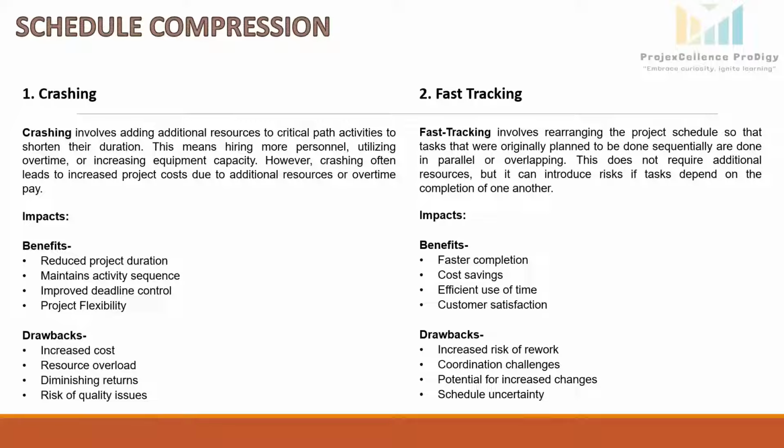So, what will he do? He will hire additional workers to speed up construction activities. He will bring in more subcontractors to work on different tasks. He may extend work hours by scheduling 2 or 3 shifts to keep construction going 24/7. He may rent additional equipment like cranes and excavators. So, what impact will there be on the project?